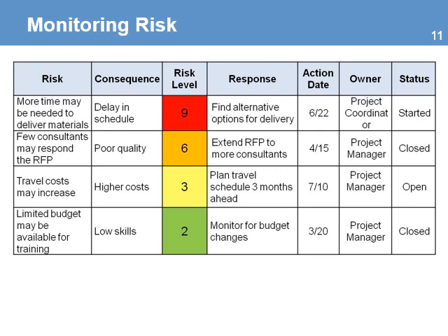Another important area that you need to monitor is risk, and you can use the risk matrix developed in the planning phase. During the monitoring phase, you will meet with the different risk owners and ask them to provide a status on the work they are responsible for managing each risk. The update will give you an idea of the progress made.